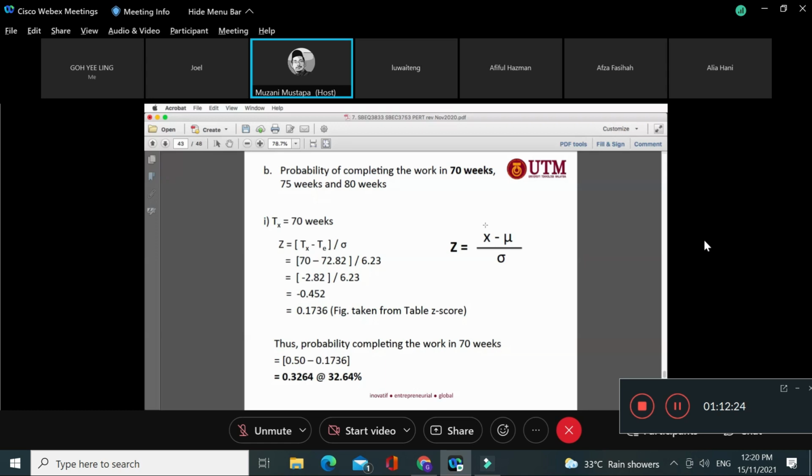So the main contractor can use PERT to analyse the subcontractor for piling work or any activity they sub or outsource, to see the probability that the particular activity can be done according to the time given to them. This is how the analysis can be carried out.